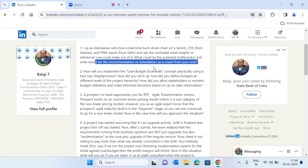For example, when looking into the cumulative flow diagram, analyzing the horizontal distance between the lines can reveal certain insights. In a cumulative flow diagram, the distance between two lines should be optimum — neither too close nor too far apart. Also, wherever a line is parallel to the horizontal x-axis, it fundamentally means throughput is zero over that time span, meaning no work got completed within that particular period.